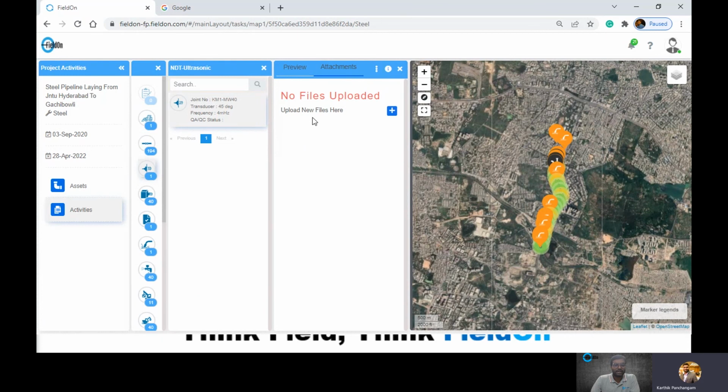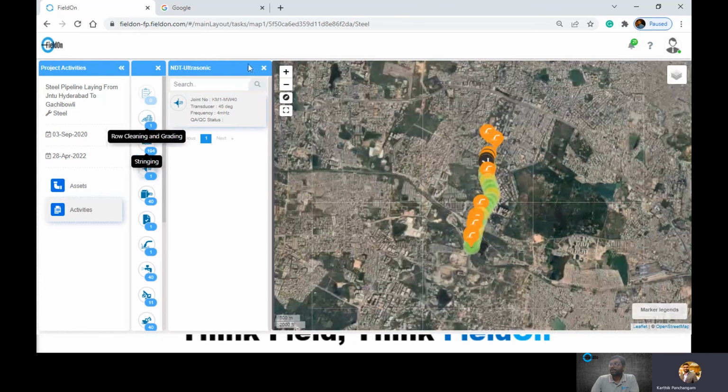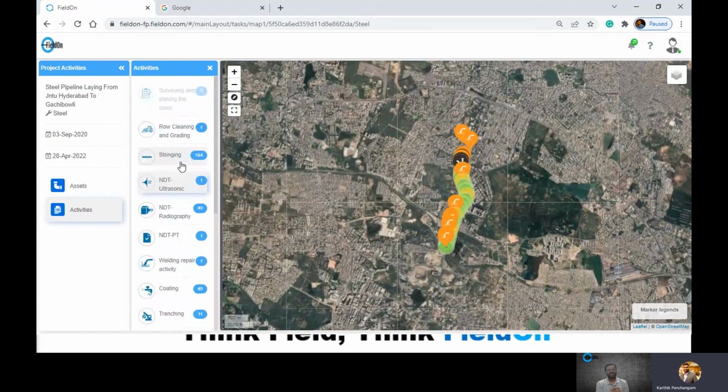Documents or the radiography reports are being attached so that they can be assessed by the quality team. Multiple levels of quality can be introduced, one at the contractor level, one at the regional level, one at the central office level, one at an external audit level, so that various levels of quality checks are passed before the information is actually approved.